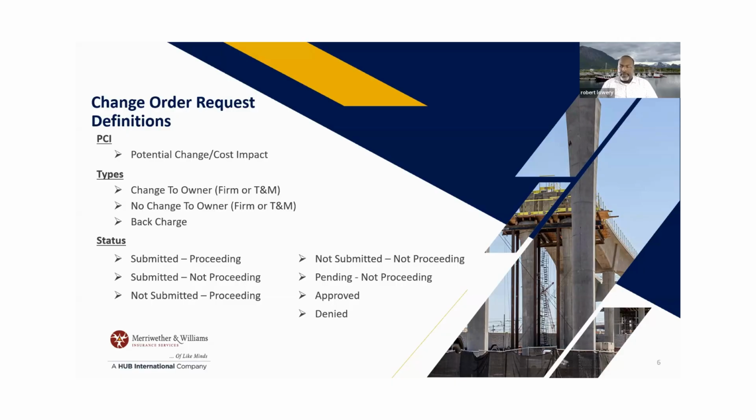Now, when you see that comes back on your change order request approved under protest, so there's something in there that the owner or the GC is not comfortable with, but is on the time trying to get it done. So there could be come back to you after it's approved and say, hey, can we reconcile this change order? I really don't agree with your costs here.